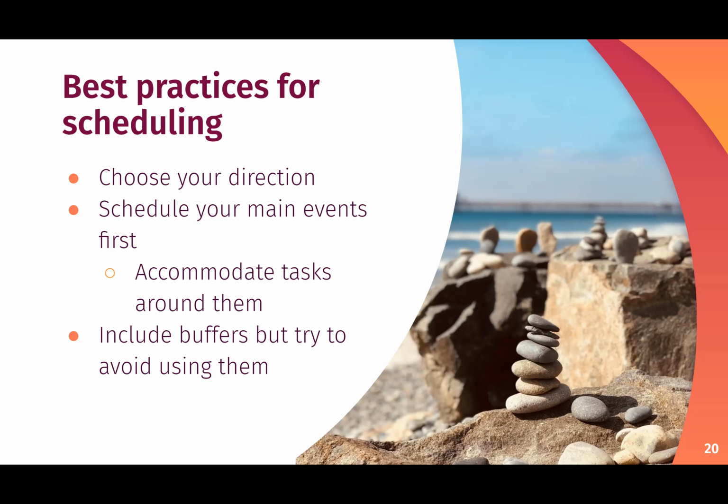Include buffers, but try to avoid using them. I feel like this is common sense, but I will add buffers to the buffers, because you will be using them. I know we say, oh, try to not use a buffer. You always end up using them. And sometimes, if you're working with other people, what you may want to do is have buffers, but don't tell people that there are buffers.